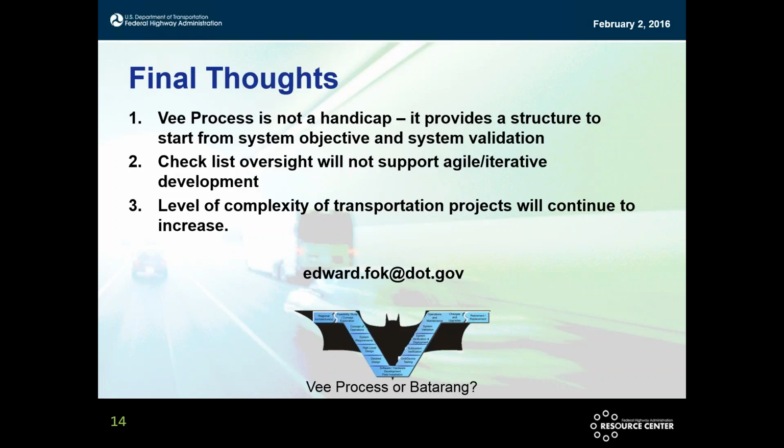I'll tell you that we've applied Agile to safety critical software development, and it just means that the levels of testing are built in. Essentially, your test suite includes this safety testing to the boundaries, and all the artifacts are traceable and available for evidence.